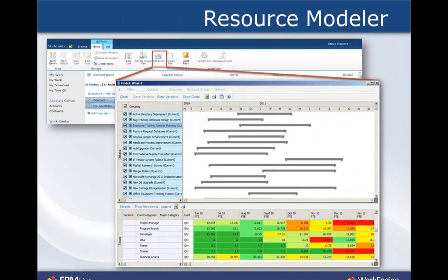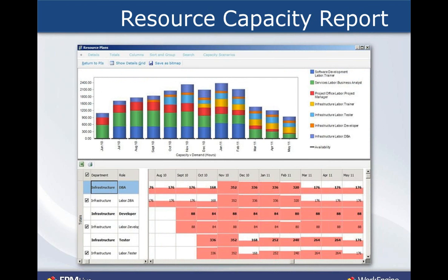And then by putting these resource capacity plans on an individual basis, on a project-by-project basis, and a resource-by-resource basis, we can start running reports and views that give us a total picture and slice this thing a number of different ways. In this one example, looking at a department and seeing if we're over or under capacity for the department. And then in the individual disciplines, for example, within that department, do we have the capacity within those individual resource types or disciplines?